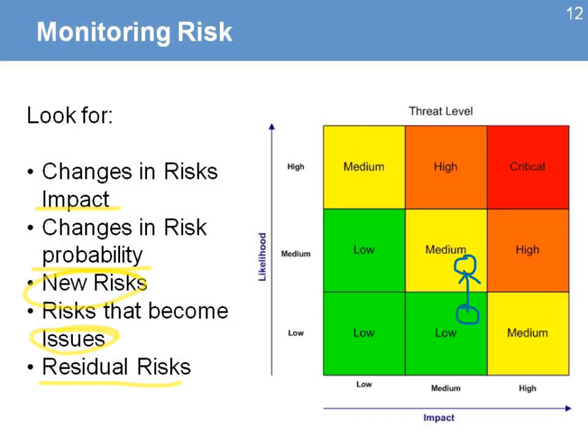You can also have a risk that was initially having a low impact but high probability, but now it has moved. Now it is high probability and high impact. Again, whatever strategies you had before will not work, and you will need to change your strategies to address the risk that is now at high probability and high impact. And this is an exercise that needs to happen constantly, on periodic reviews of the project. You look at the risk and see if the information you have is better, so that you can then change your strategies depending on where the risk is now located.